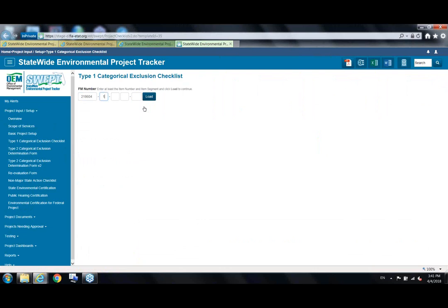The project needs to exist with that FM number in that bank account. That shows that we're thinking about it, we're spending money on it, it's been programmed. So what you do initially when someone is setting up one of these projects is verify that the FM they've been given, which says this work is going to be performed, actually exists in that database.